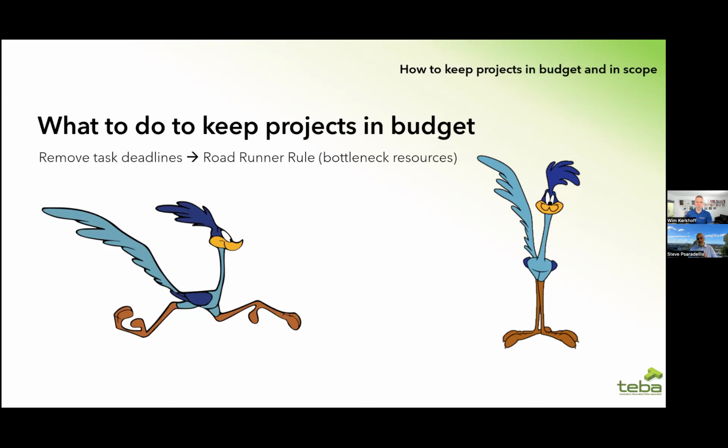Exactly the opposite. What you want to do with your bottleneck resource, if there's a small delay, instead of them running flat out, they need to stop. And when I say stop, they need to go and have a cup of coffee, grab, well, if it's a Friday afternoon, they can go and grab a beer at the pub. You want to avoid giving them anything that's going to take time away from the project. So coming to a complete stop is the best thing you can do for your bottleneck resources.